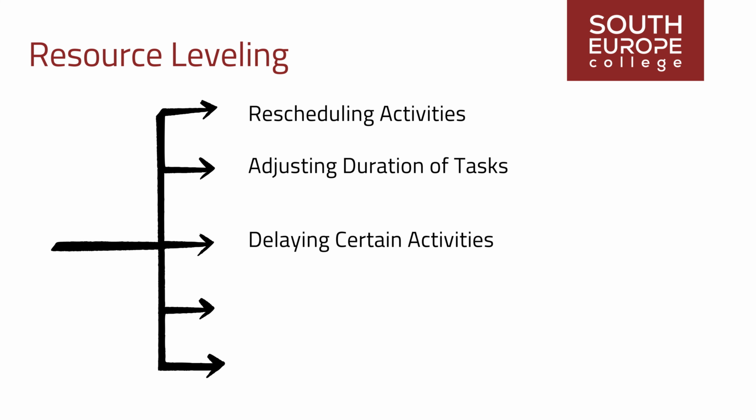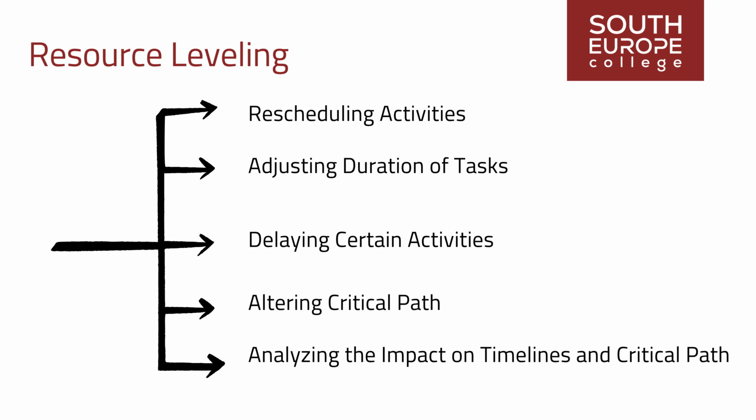Additionally, resource leveling can alter the project's critical path as the timing and dependencies of activities are adjusted to accommodate resource constraints. Consequently, project managers must carefully analyze the impact of resource leveling on project timelines and critical path activities to ensure that project objectives are still achievable.